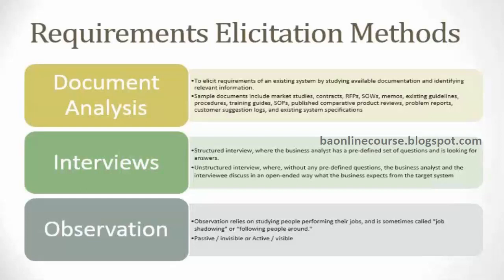The customer? Yes. Okay. So what happens after the change request form is filled in? The next step. So we would need to check what changes are required and how the cost is related to it, and do the analysis. We'll analyze the requirement, timeline, and whether it goes with the budget and design according to the timelines?